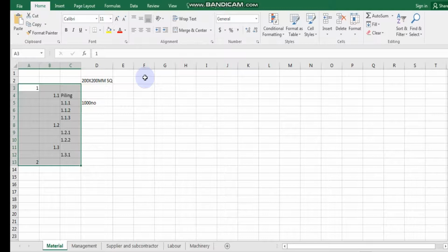From this allocation, you will know the numbers that are required, and if the number that you have is very different from the number that you require, then you need to remark or highlight that, and it will be reflected in your schedule later. I'll be explaining the schedule in the next recording, the Tuesday recording, week 5 Tuesday recording. I'm a bit confused with my dates, sorry. It's going to be the Tuesday recording, which is coming up in the following week actually.